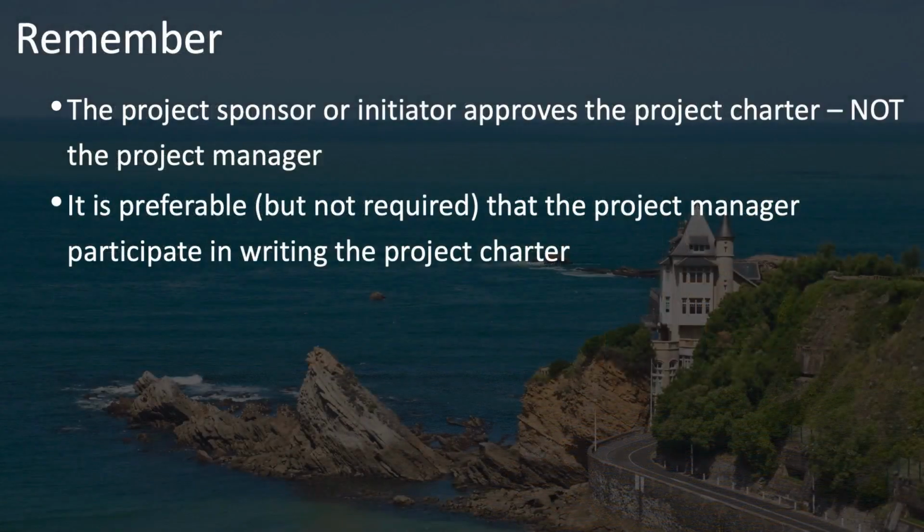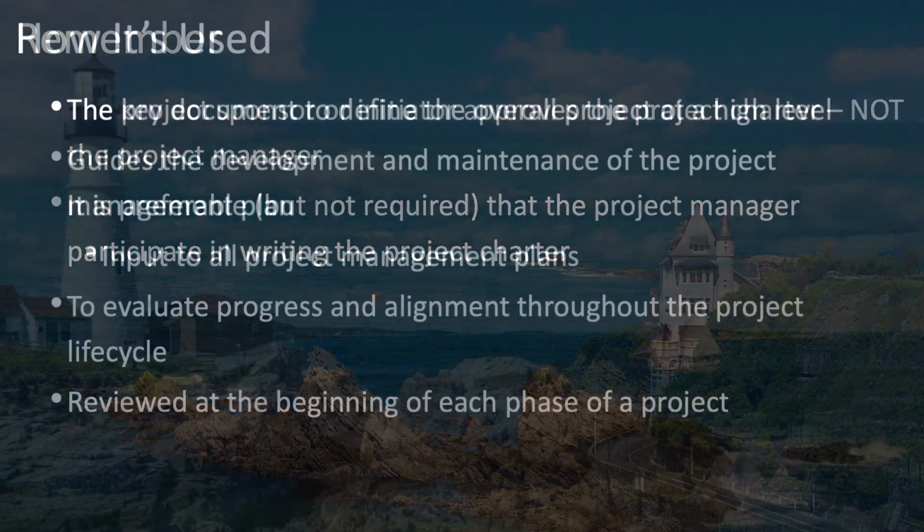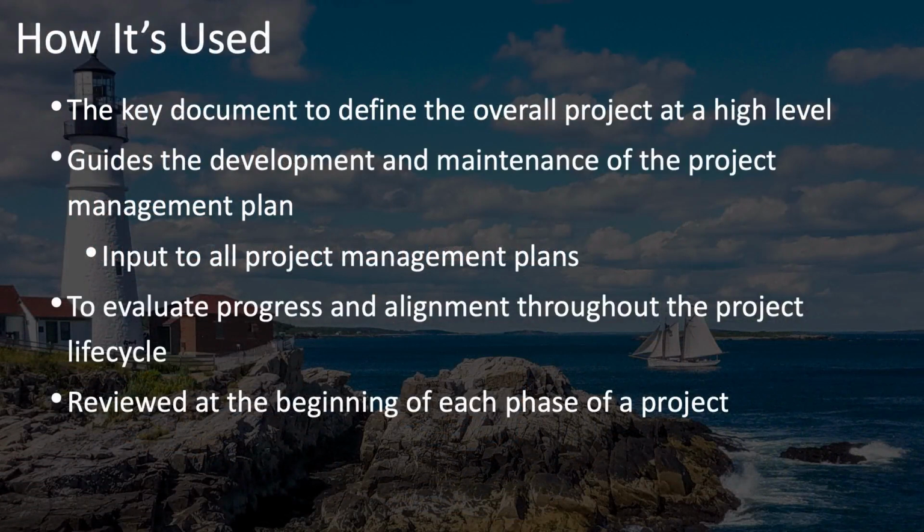Remember that it's the project sponsor or initiator that approves the project charter, not the project manager, and that it's preferable but not required that the project manager participate in the writing of the project charter. The project charter is the key document that defines the overall project at a high level, guides the development and maintenance of the project management plan, and is, of course, an input to all of your project management plans. It's used to evaluate progress and alignment throughout the project lifecycle, and it's reviewed at the beginning of each phase of a project.